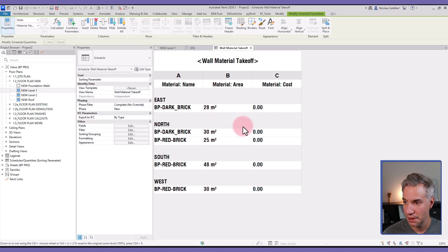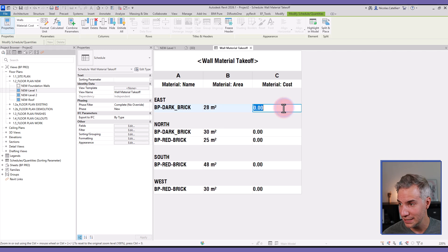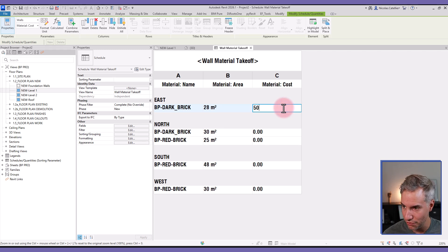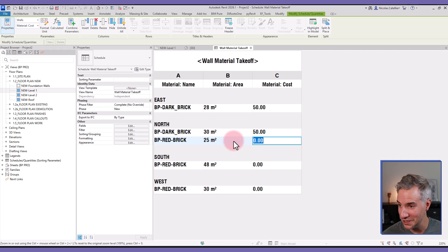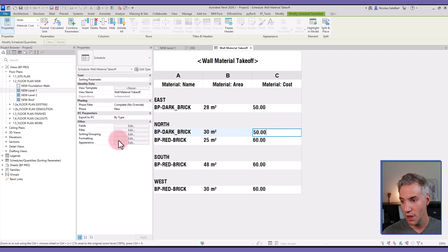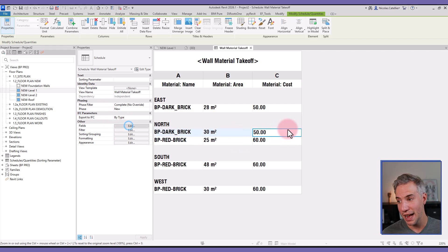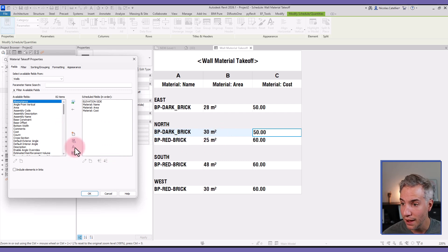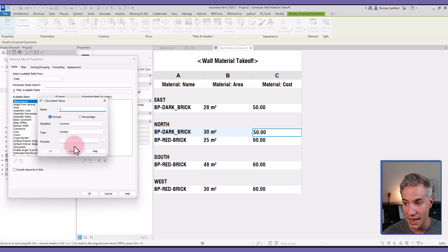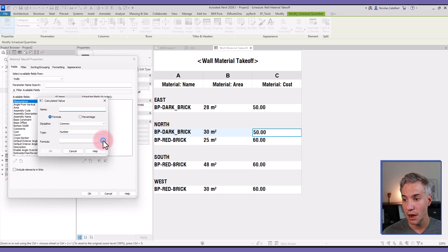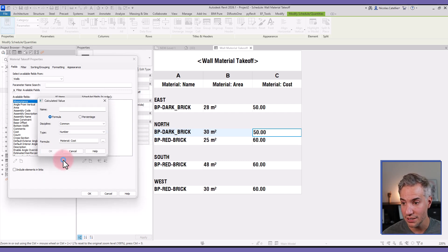Just like this. Okay, now it would be nice to have a cost estimation. So I can select the cost and set the cost for the dark brick—and this is just random, of course. Let's say the red brick is slightly more expensive. And if we want to have the total cost of the brick, I will create a calculated value. So I'm going back to the Fields, clicking on Calculated Parameter. I will select the formula: the Material Cost multiplied by the Material Area.